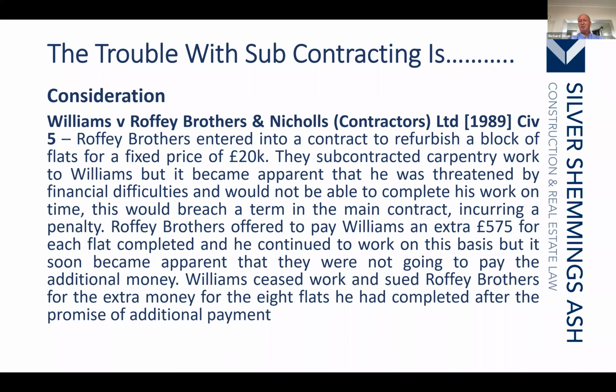The courts disagreed because under most contracts, whilst there is a completion date, the subcontractor doesn't actually have to complete by that completion date because the contract provides for damages if they don't. It provides for extensions of time, thereby identifying that you don't have to complete by the completion date, recognizing that it might not occur.